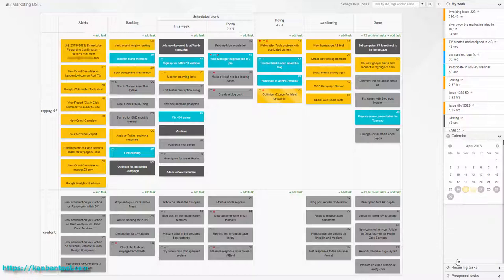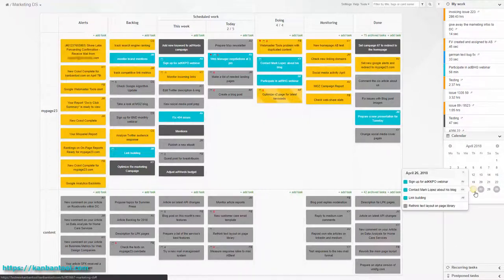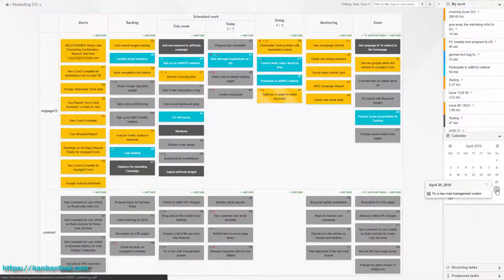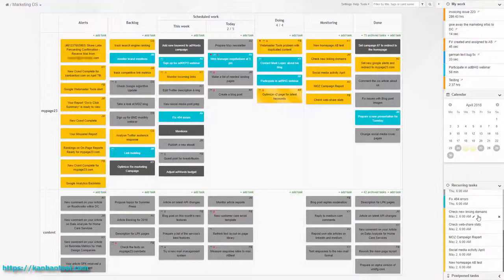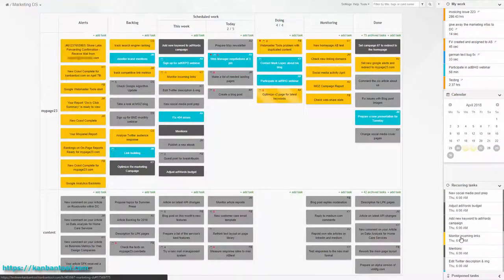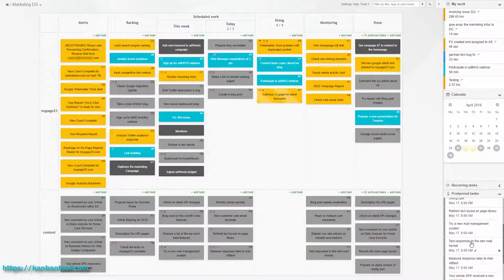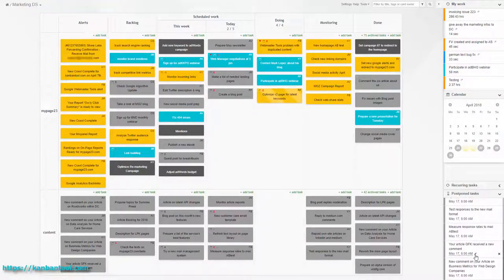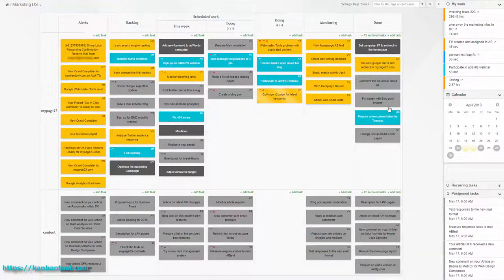In addition, the team has switched on a few extra Kanban tool features for their board: a calendar with a highlight of all due dates, recurring tasks for monitoring jobs which need doing on a monthly or weekly basis. They also used postponed tasks for items planned for further down the line, so that the board doesn't get cluttered.